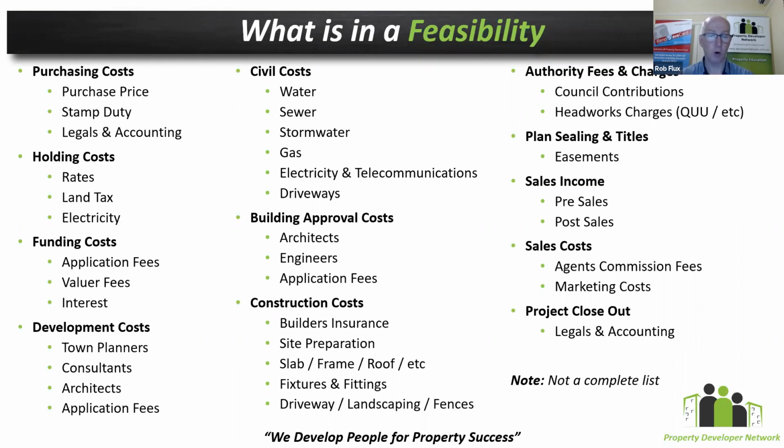Now, while we're talking about the contingency, I consider contingency an absolute cost in the project, and I don't count it towards my profit. I consider it an expense that is already spent when it comes to assessing the viability of the deal. When it comes to the running of the deal, I do the exact reverse.